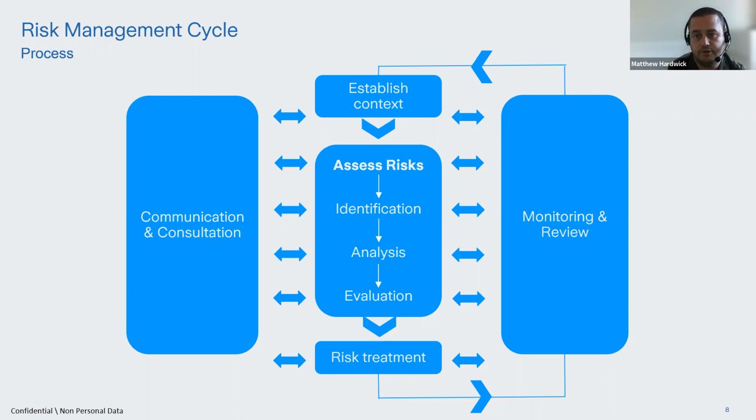Or it may well be that we're trying to recruit into a very specialised area, and just attracting those skills is very difficult. So straight away, we've gone from service delivery being the risk to actually identifying that we've got perhaps some disparity in the budget structure for this particular role that then is leading into a series of consequences, not least difficulty filling posts, that leads to increased capacity on existing workforce. And ultimately, how big, how bad does that get? That gets us into the service delivery having the knock-on impact.